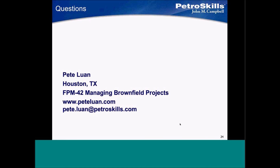Next question: what seems to be a reasonable level of contingency to plan for with a brownfield versus greenfield project? That is an excellent question, and I get it asked at every single one of these sessions. First: whoever's planning the turnaround should have work that they're immediately ready to pull out and delete if other work surfaces. Inherently, these carry a lot more risk because you have a very short timeframe to do the work. Operations may tend to throw a lot of resources at it.